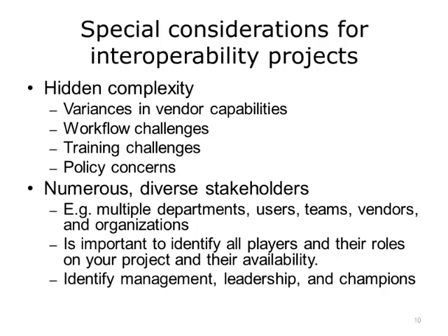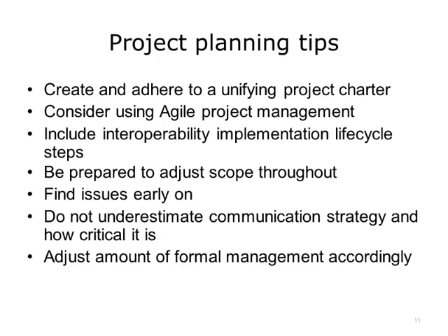It is very important to identify all the players and their roles, especially project management and leadership. Because there could be many stakeholders, leadership must be clear. A tip for planning an implementation project is to create and adhere to a unifying project charter. Since the project spans departments and organizations, it is especially important to have a shared vision.